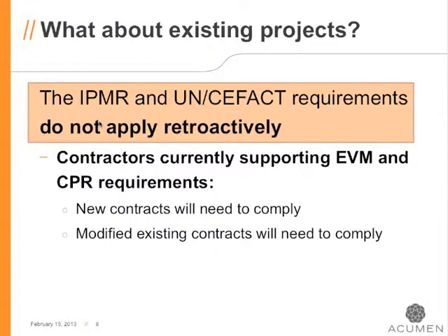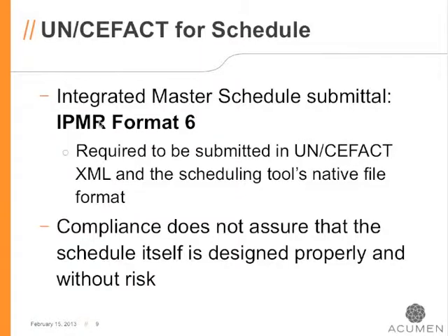I can't give you general guidance on this, but I can say, if you're working a project now and it is set to experience maybe a very significant mod, a multi-million-dollar modification, it is entirely possible that the reporting for that modification, CLIN, if you will, will require the IPMR DID and the UN/CEFACT format compliance.